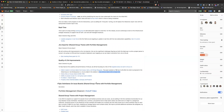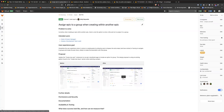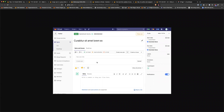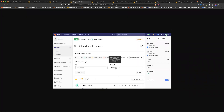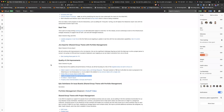We're also working on the ability to assign an epic to a subgroup upon creation. Right now when you create an epic at a top-level group, you can't assign it to a subgroup. After this improvement, you'll be able to select the subgroup you want to assign it to. The benefit is you can do top-down planning — if you have a subgroup that's part of your portfolio and value stream, you can create the epic, assign it there, and have it automatically show up in your epic planning as well as at that subgroup level.